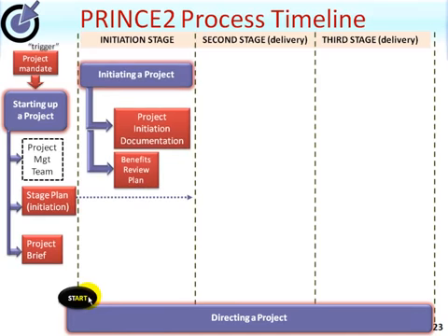If the answer is to proceed, then the initiation stage begins. This is the first stage in any PRINCE2 project. And here we'll use the process initiating a project, which is there to pull together the various documents contained within the PID itself. These documents would consist of the project plan, the business case, and various strategy documents, as we'll look at later. Worthy of note, however, is the benefits review plan, which does not form part of the PID.